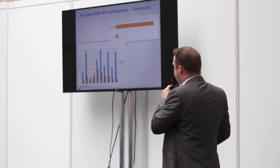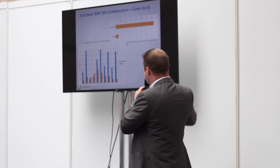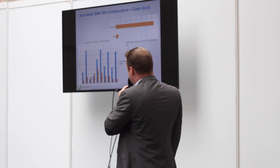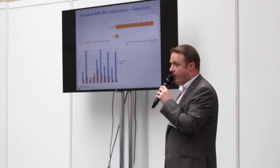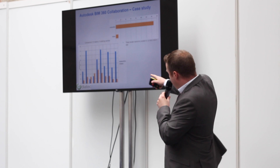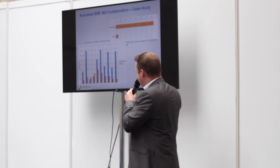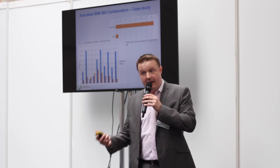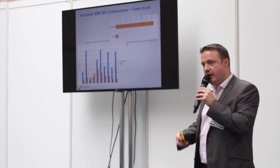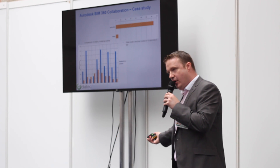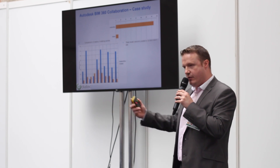Looking at an example from a real project: on a traditional project, total model versions posted to the collaboration site was between 0 and 20. On a BIM 360 Glue project, it was nearly 140 — not 140 different versions, but 140 variations because the model is constantly getting updated and changed, not periodically pushed at random times. Comparing weekly modelling activity, a Glue-based project shows significantly more activity because there's a lot more communication and collaboration happening on a day-to-day, hour-to-hour basis. People aren't waiting for information drops via email or FTP.